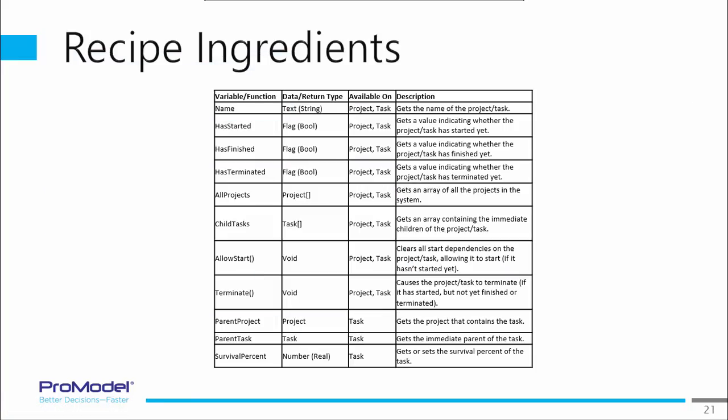These are some of the ideas that we have for system functions like the terminate. The other one, the opposite of the terminate, would be triggering a start. So instead of saying, oh, you're already active and I want to terminate you, maybe you want to, like in the pharmaceutical world, they called it parachuting, where they actually look inside the system and say, well, there's a gap in revenue at a certain time frame. Whenever it dips below this threshold, I want to look at my shelved projects and I want to bring them in. And instead of writing 1,000 different scenarios of exploring which ones to bring in, I could write a little script and have it dynamically decide when I want to do it, and that is my prescription, the logic itself. You can manipulate metadata on the projects.